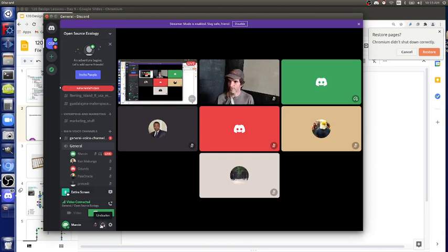Right. That's why the concept of milestones violates the concept of modularity. Because it's all in parallel. The idea is that you can develop an unlimited amount of parallel things as long as you define the interface. We can define the interface. Therefore, you can work on everything at the same time. I think that's the logic there. And then milestones of like the level of completion, like prototype one, near product release, something like that makes sense, where you're still working on the whole thing at the same time.